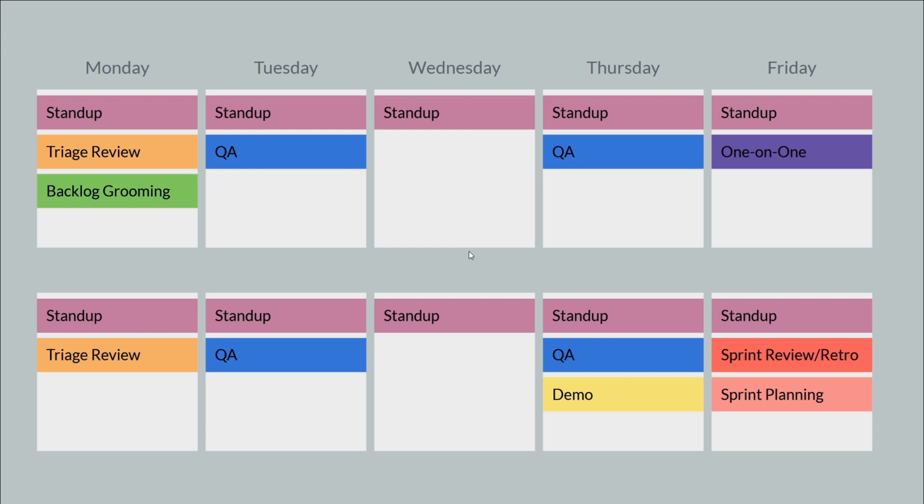I don't know. So then we're in the second week here. The last Thursday of the sprint, we'll do a demo for the user. Most of the work should have been finished up by that week. There's a QA that morning, so we may have pushed all the work out into prod, and then you can demo that work to them. And then the last day of the sprint, there's a sprint review and retro and a sprint planning.